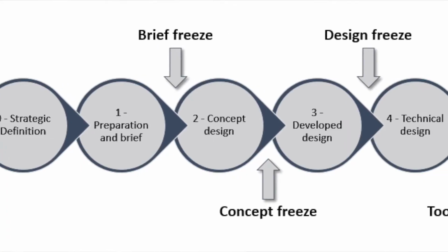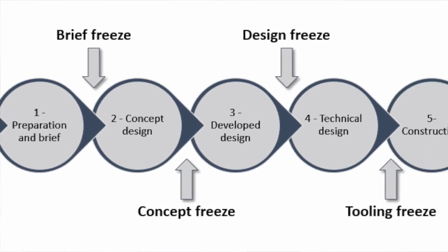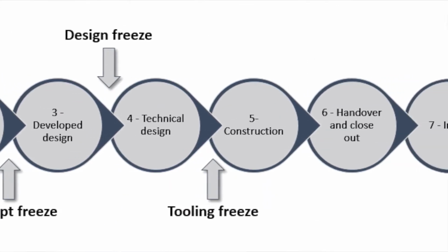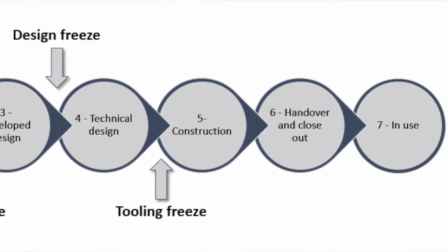Before manufacturing can commence, the design needs to be completed in a design stage freeze. Changes to the design after the design freeze will likely cause rework with associated time delays and increased costs. In this respect, communication between the parties is essential.